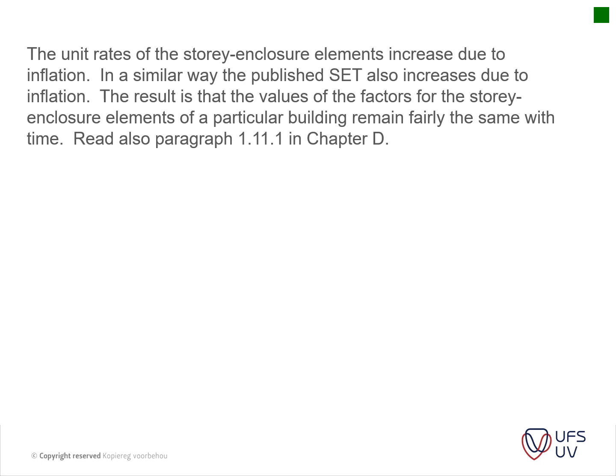Okay, the unit rate of a story enclosure element increases due to inflation. In a similar way, the published tariff also increases due to inflation. The result is that the values of the factor for the story enclosure elements of a particular building remain fairly the same with time.